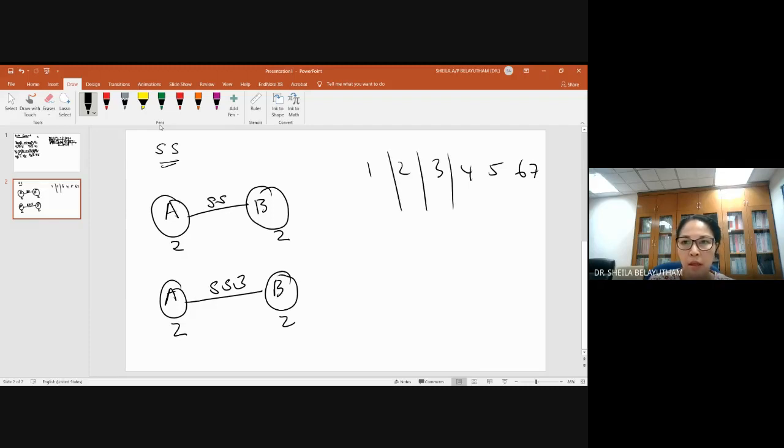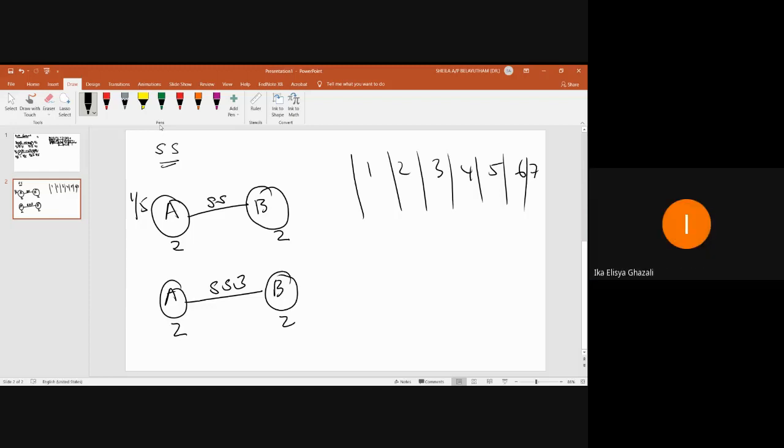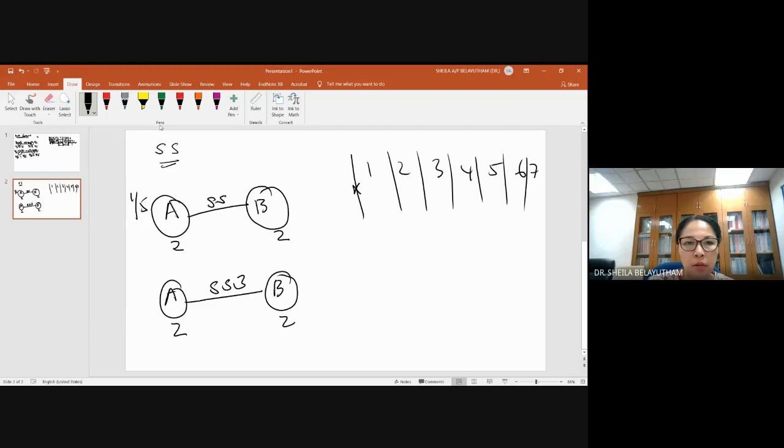Okay, so let's say this is the calendar. All right. So let's say we start our activity on the 1st. Okay, so 2 working days, when will I finish? Second. Okay, so I start on the 1st, 2 working days. I would finish, it shows the finish of 2nd. So you just think that 2 working days, you work 2 days. Morning afternoon, morning afternoon. So you will finish the 2nd evening too.